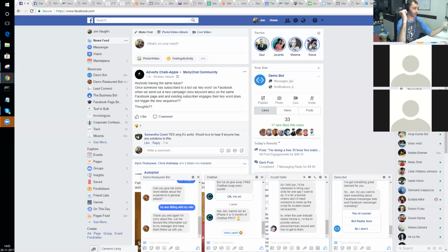Once you agree to the budget, we come up with the SRS. Once you sign off on the SRS, we build out the full project plan, which condenses that budget to a very, very small range. Since we now know exactly what we're going to build and we've removed all the ambiguity, we can be a lot more specific about how much time this is going to take to build, in production hours and in total delivery hours.